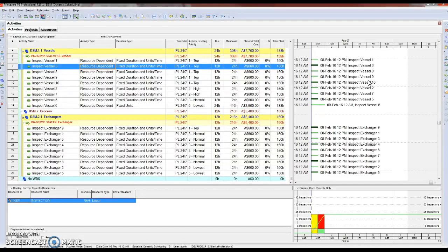But in reality, the WBS work breakdown structure really is the physical layout of the facility and all of its production physical assets. And what I mean by that is you have a work breakdown structure, which is a vertical representation, a hierarchy of equipment and systems and units and areas that have no time associated with them.